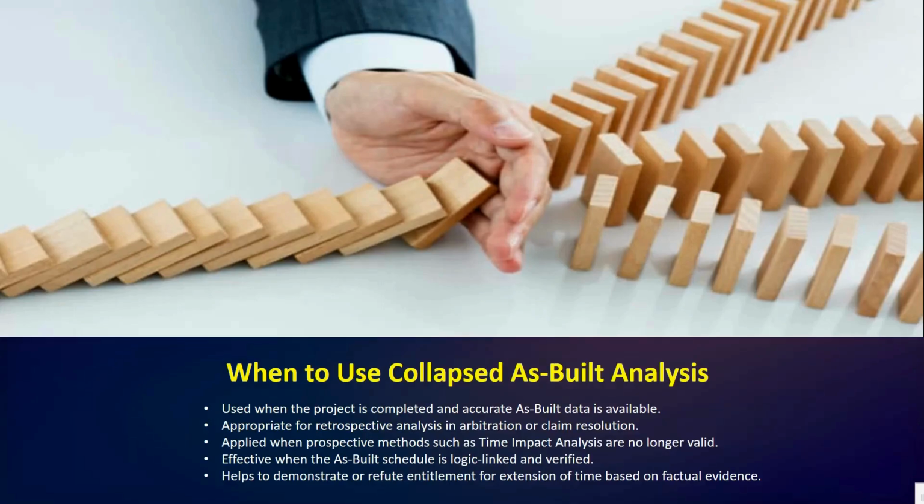Next we have when to use collapsed as-built analysis. This method is typically used after project completion when reliable and verified as-built data is available. It is especially valuable in arbitrations, claims resolutions, or expert witness analysis, when prospective techniques like time impact analysis can no longer be applied.